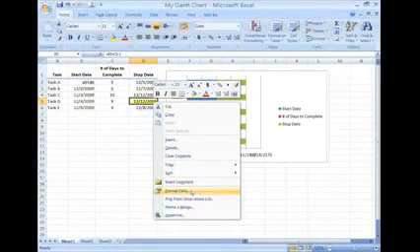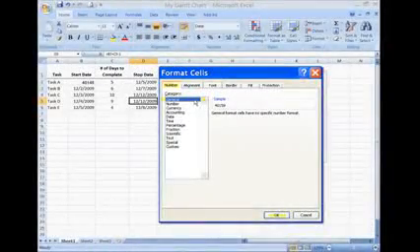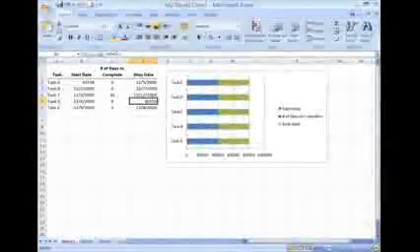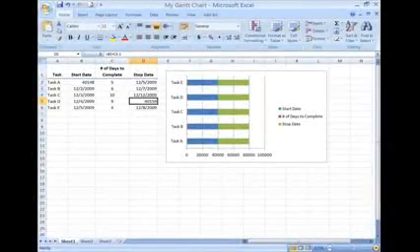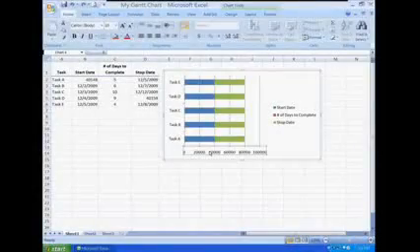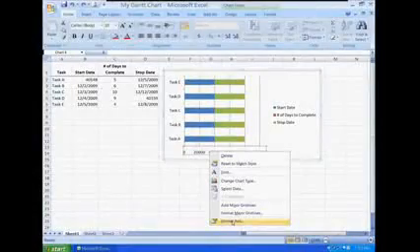Now for the maximum value. In this table, the latest stop date is in cell D5, not in the last cell in the table. Right-click on it and click Format Cells on the menu. Click the Number tab, click on General, and click OK. We're ready to adjust the x-axis. Click on the numbers along the bottom to select the x-axis. An outline shows it selected. Right-click on it to open the menu, and then click Format Axis.